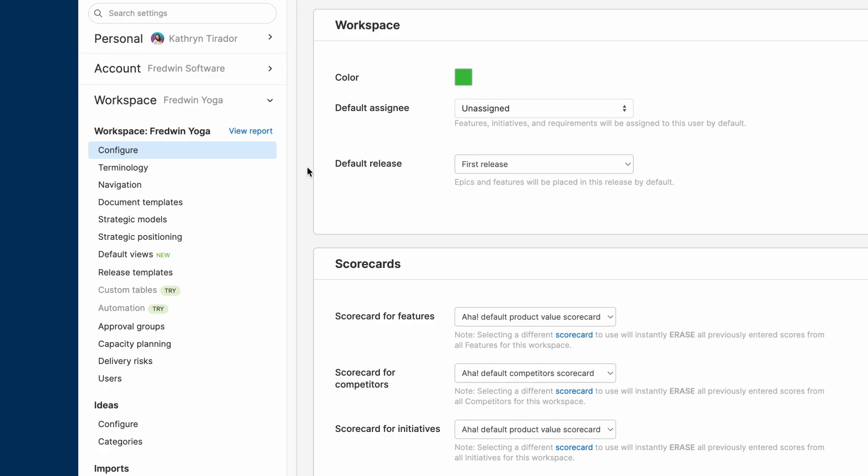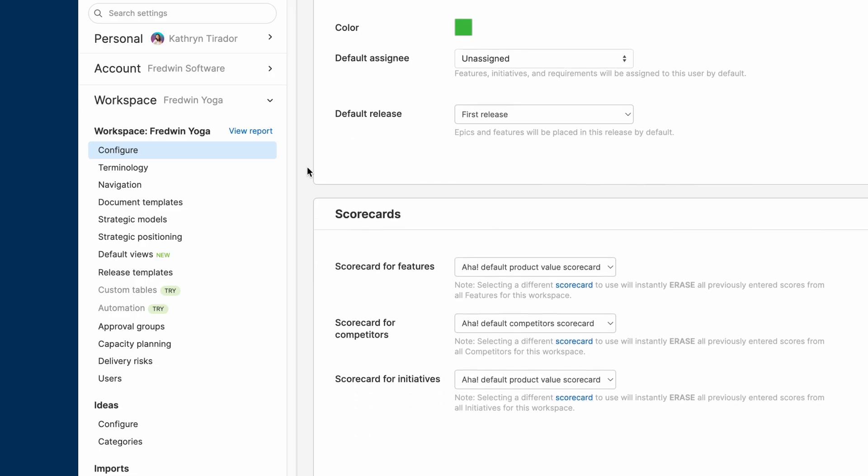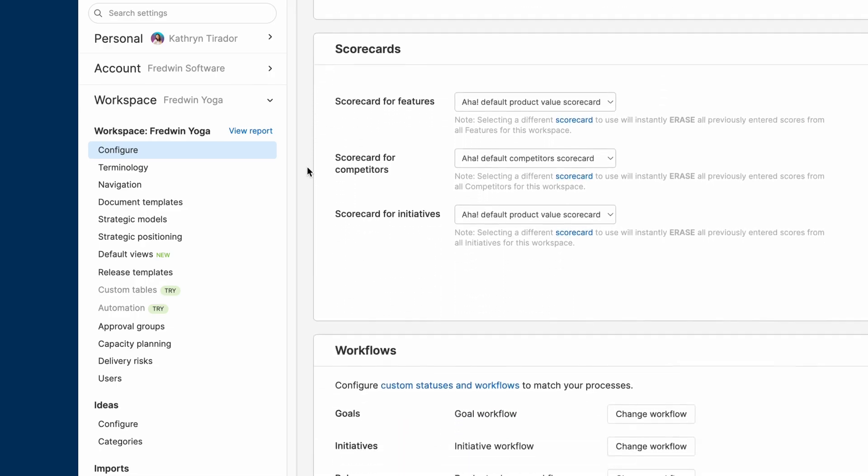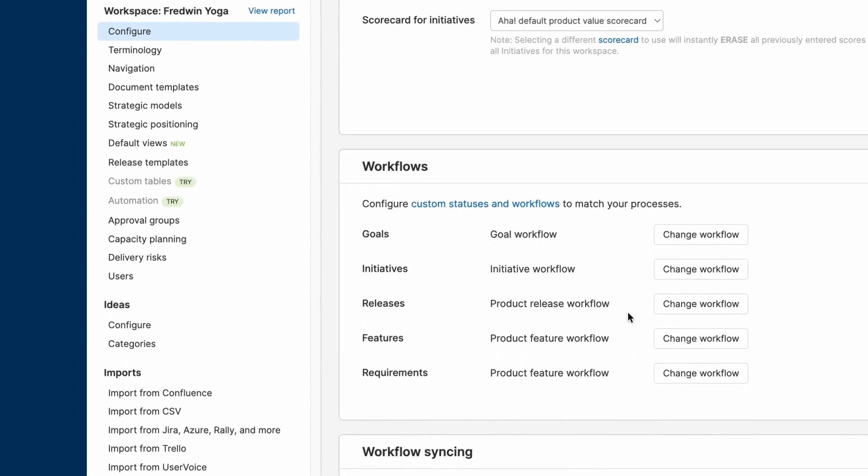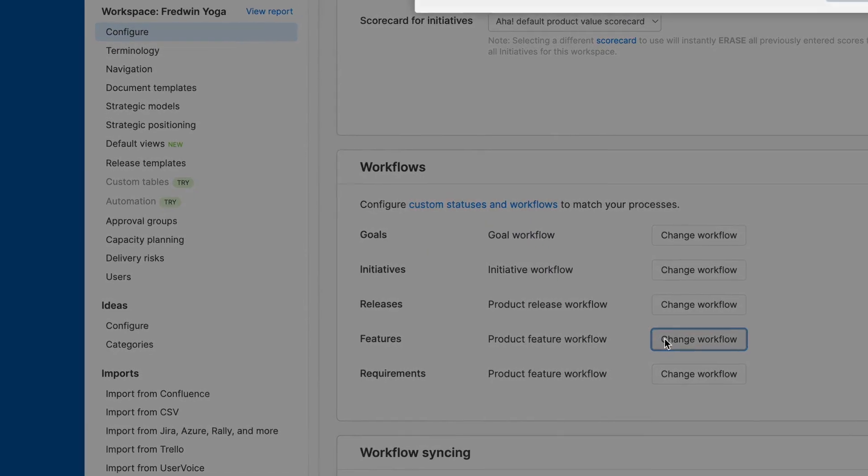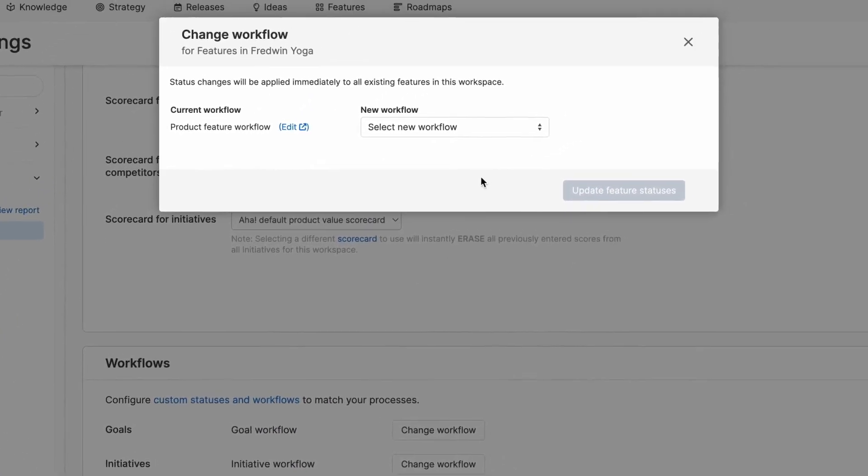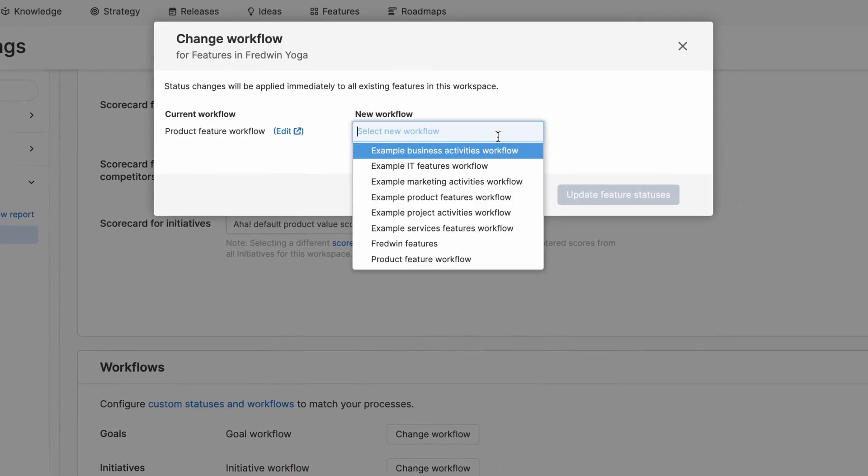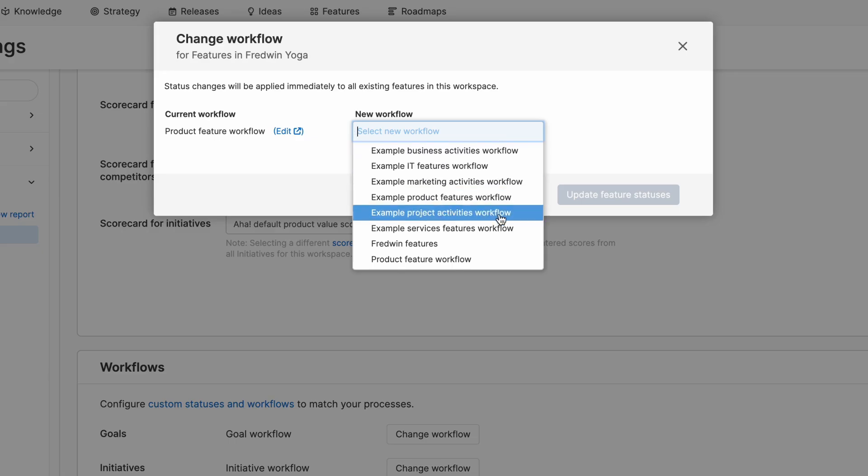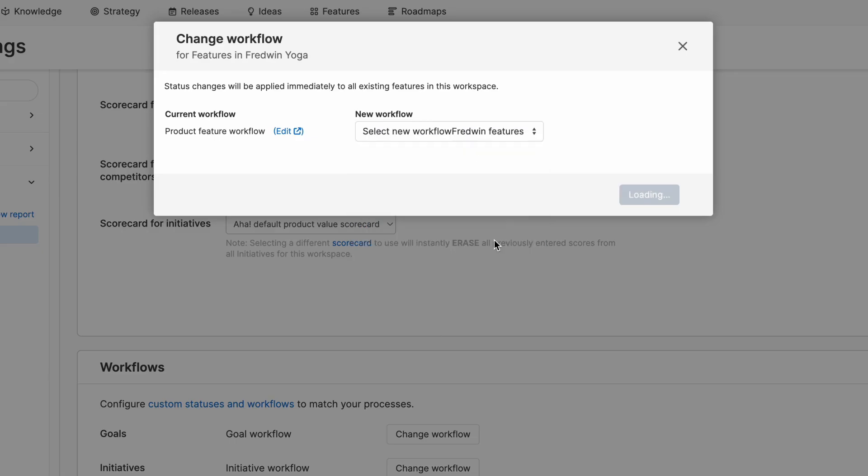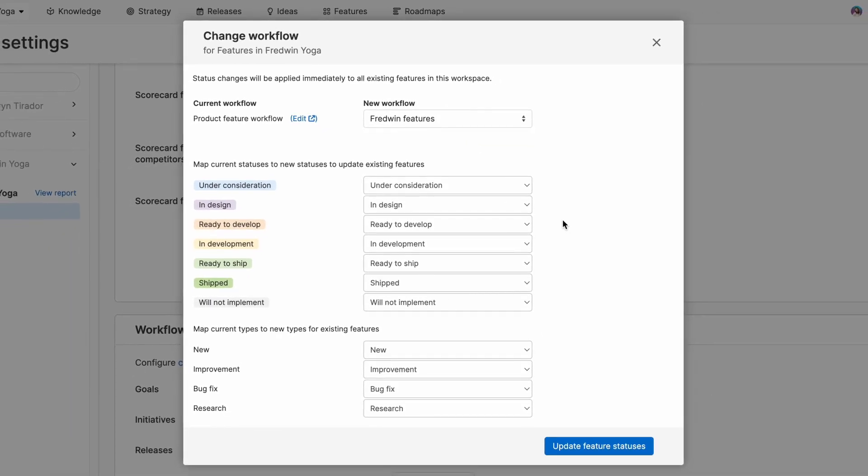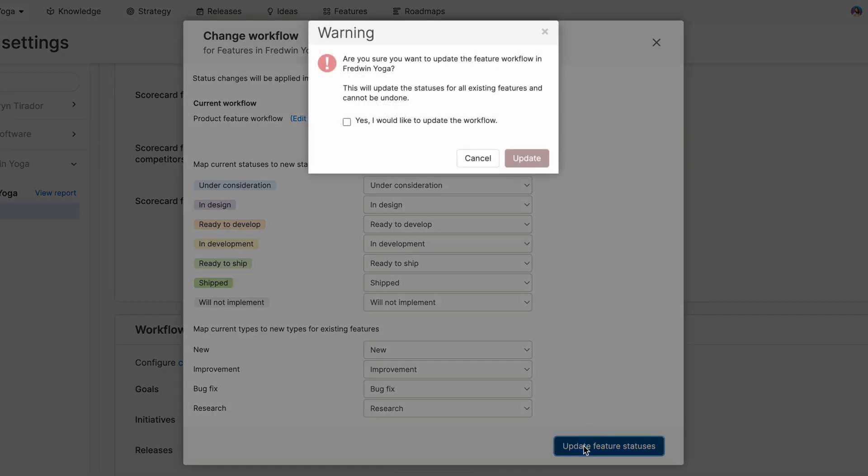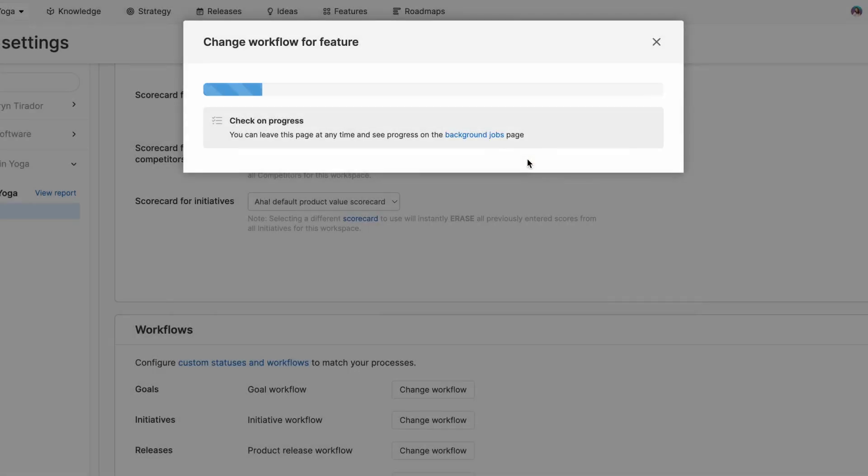So for my scorecards here, I'm just going to stick with the existing ones that you see here, but I do want to change my workflow. So I'm going to go into my features workflow and choose a workflow that I previously created in my account settings called Fredwin features. I can choose how to map existing statuses to the new ones for a smooth transition to this new workflow. So let me update my feature statuses and confirm that I would like to update the workflow.